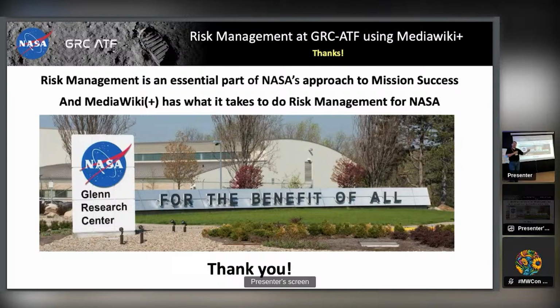What's a challenge is when you're trying to maintain traditional methods and also simultaneously implement something different like the wiki approach. And so when we're in a mixed mode is when we're most at risk. And so my management's lesson learned is to make the transition as quickly and efficiently as you can, and don't spend any time trying to do both.